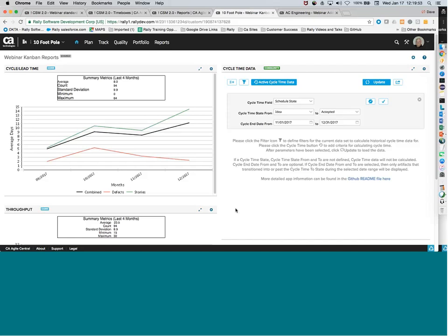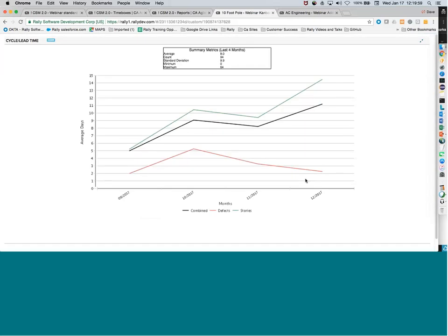And the idea, in terms of helping the teams get better, is we now can understand, as we're converging those, we certainly like to make sure that we're closing off the defects at least at the same rate that we're opening them, hopefully quicker, so that we don't diverge those lines. So having those going apart would be a bad indication.